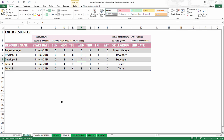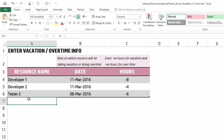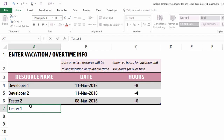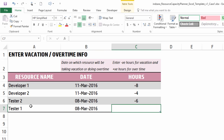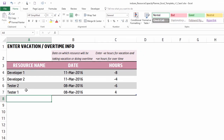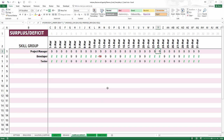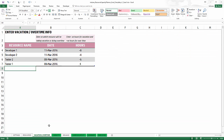The second option is overtime. For example, Tester 1 can do overtime on March 8th for four hours — I enter this as a positive four hours in the vacation/overtime sheet. Now when I go to the surplus/deficit sheet, the March 8th deficit is gone because I filled that gap by adding overtime for Tester 1.